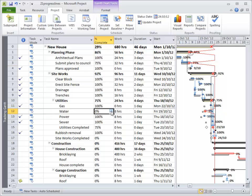There's also a problem here — the water hasn't been done. It's the 24th of October and that was meant to be done on the 19th. In real life, these things will happen and you'll have to work around them and cart in water or find some other solution to the problem. But this visually just shows you, hey, don't forget about those items — we need to get them done.